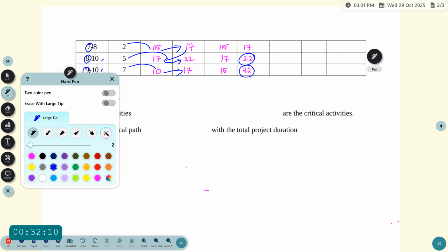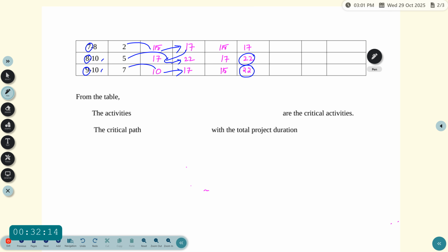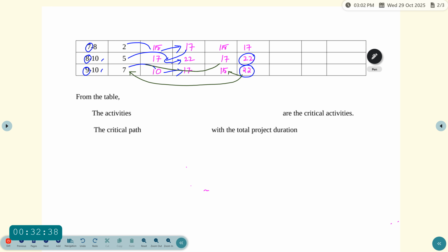So next one. You have used the formula in earliest time. Similarly, you have to find in latest time. So you know 9 to 10, 10th value which is 22, and then subtract with the duration, we have 15. So similarly 22 subtract with 5 we have 17.